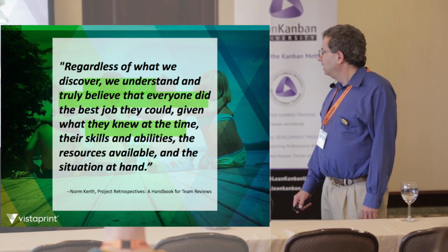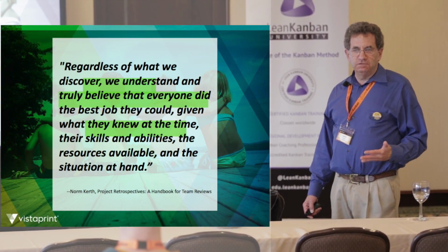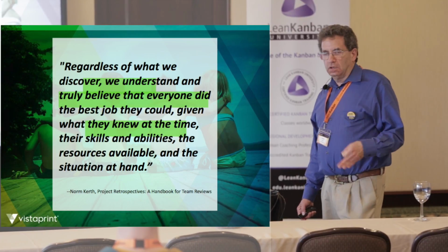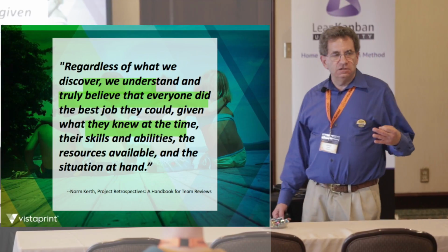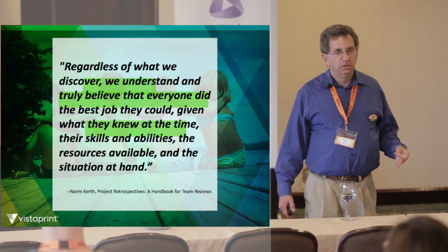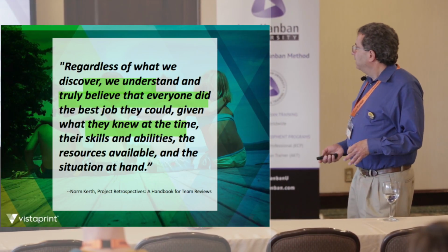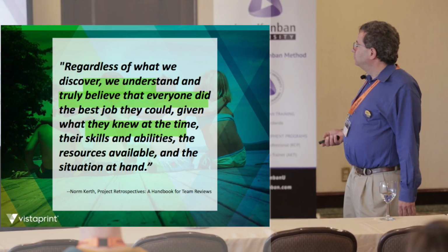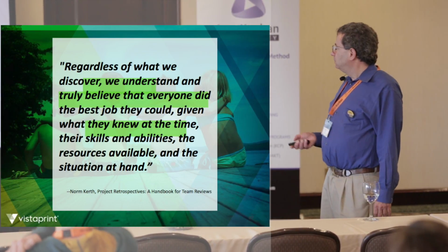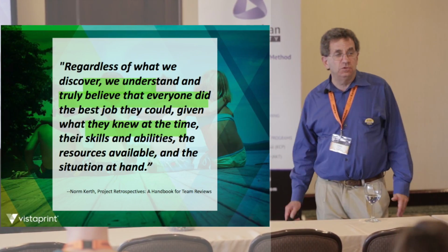We were part of this. One of the things that they did was to implement retrospectives. And one of the things that I strongly recommended is that they start every retrospective, as part of setting the stage, to go back and look at Norm Kerth's Prime Directive. Okay? And you can read it. It's basically understanding and truly believing that everybody did the best job they could, given what they knew at the time, their skills and abilities, the resources available, and the situation at hand.